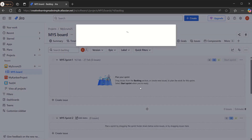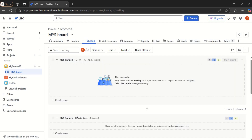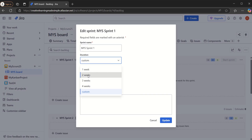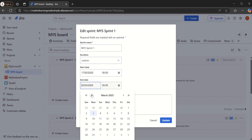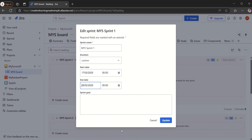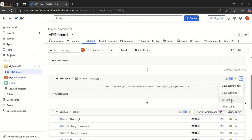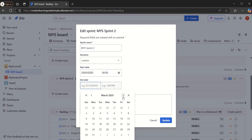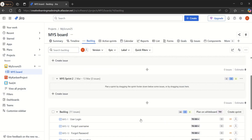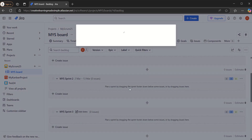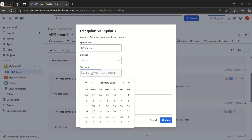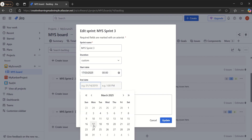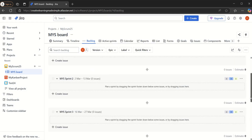For Sprint Two, we give it a name and set it as custom — starting on March 3rd and ending on March 14th. Then we create Sprint Three, also custom, starting on March 17th and ending on March 28th. So these are the three sprints our team has planned, covering roughly from February 17th through late March.